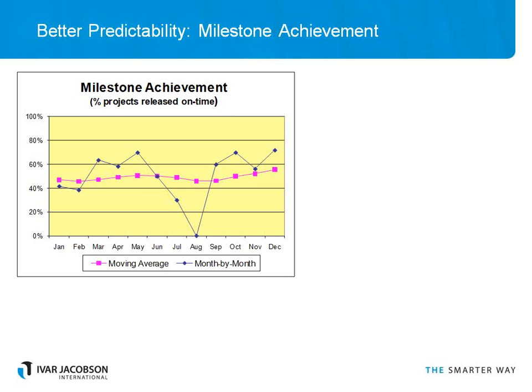It's much more interesting to look at the moving average because that eliminates those kind of seasonal fluctuations. And once you've got the numbers, you can calculate 3, 6 and 12-month moving averages, and you can look at your trend and you can measure year to date as well. So you can see in this case, this organisation are only hitting between sort of 45 and 55% of their release dates. And that's probably not good enough.